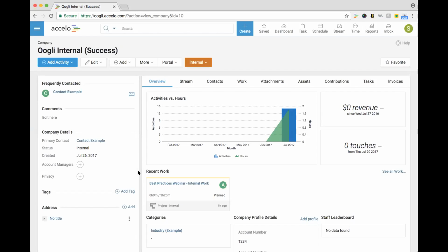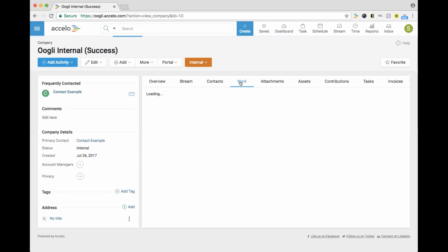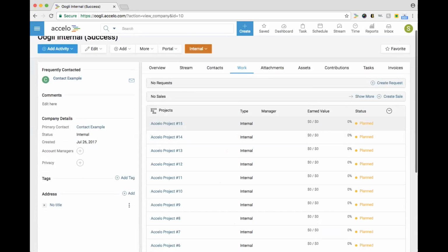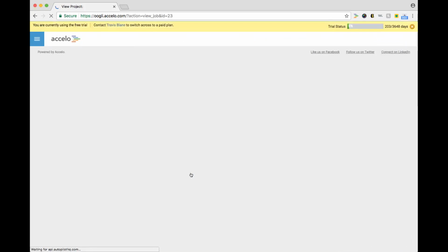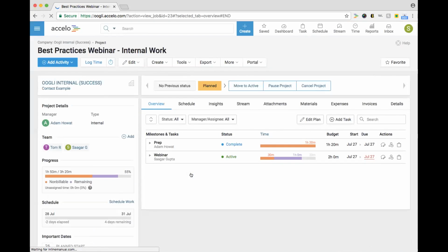So actually, you can set up different milestones to be not billable too. If you go up in any given project, the project itself can be billable, but this particular milestone can be not billable. So that's probably the best bet: having the non-billable style work be part of a milestone that's not billable.